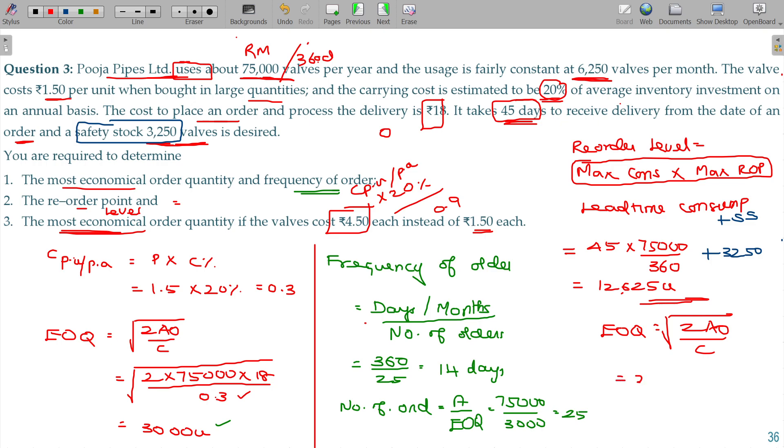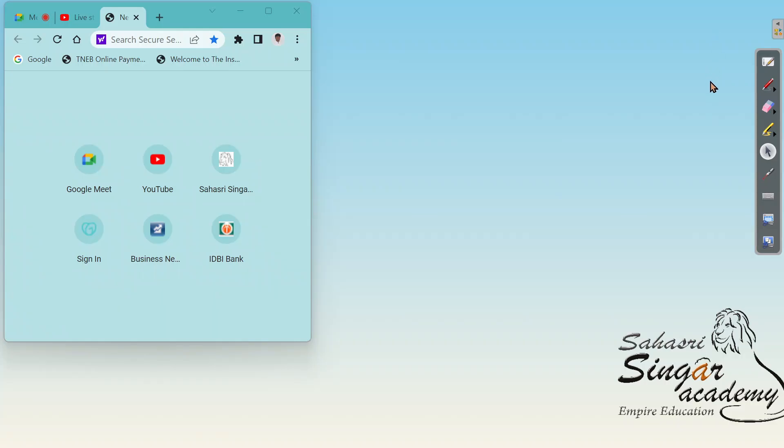Because of the price change, annual consumption remains the same, ordering cost remains the same, but carrying cost increases from 0.3 to 0.9. Then the ultimate value is 1,732 - that's the revised EOQ. Clear?